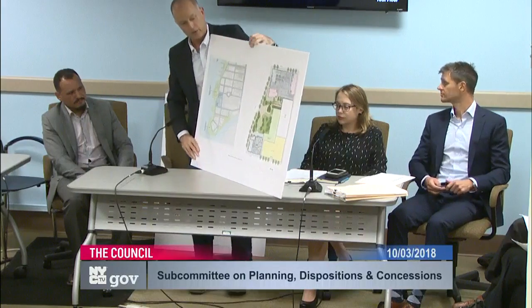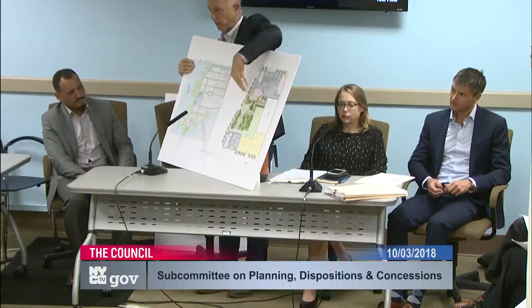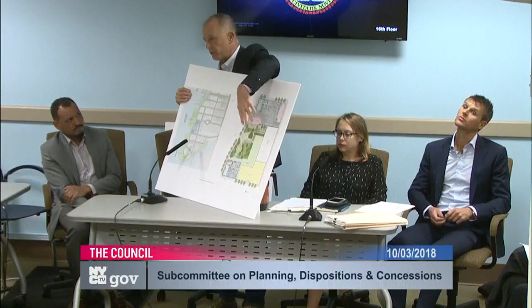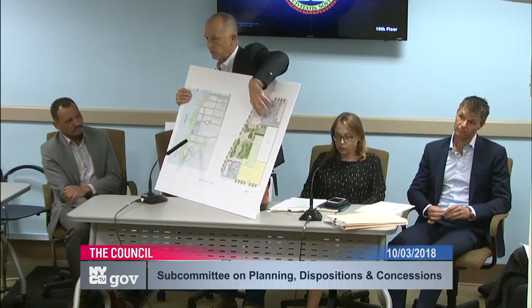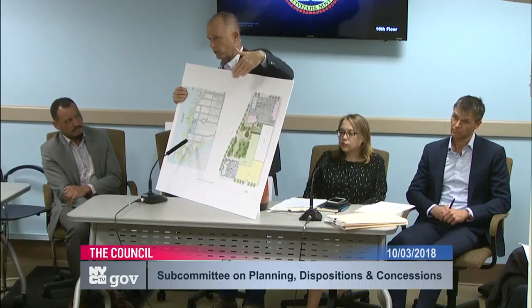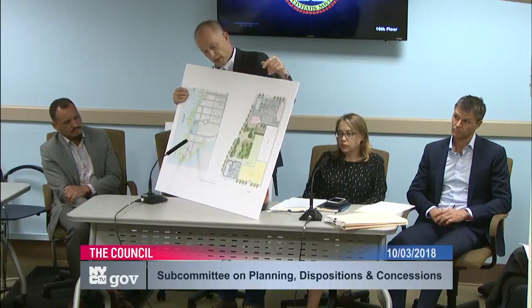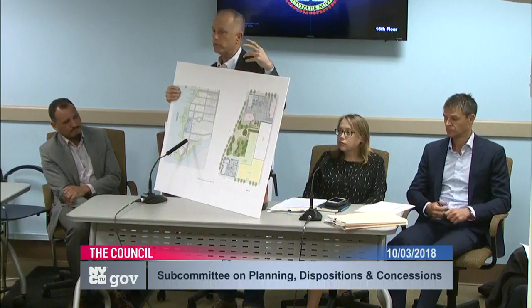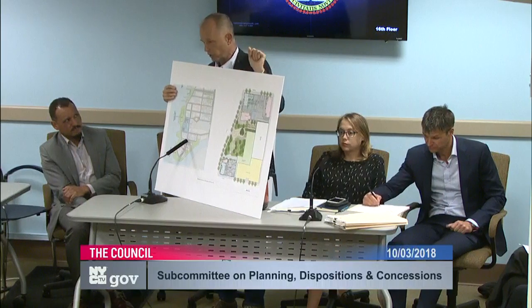And it's going to be done in 2 towers, a north tower and a south tower. Originally, there was going to be housing throughout the entire site. There's going to be a street wall along Center Boulevard, but we ran into some subterranean issues on the site, and these were problems, and so we felt it was better to move all the housing to the northern and southern end of the site. But that created an opportunity, and we worked with Councilmember Van Bramer, and we were able to bring in a public school for the site, which you can see in yellow, and a very large outdoor playground. And in the remainder of the middle of the site, we're going to be doing public open space, which will be a sort of rotating community-based sculpture garden.